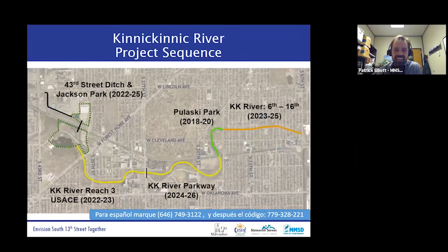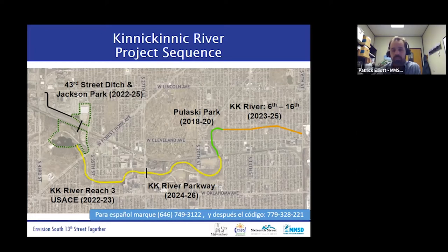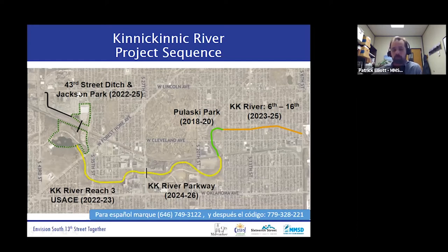We have a number of different projects to remove over three miles of concrete channel lining just on the Kinnickinnic River alone and to address flood risk. We have to construct these projects in a certain order so that we're not increasing flood risk. The 6th to 16th Street project is at the bottom of the funnel, and the recommendation is to make that area wider. But we can't do that until we hold back some of the water in the Jackson Park area, because opening up the bottom of the funnel without holding back water upstream would actually make flood conditions worse for people downstream.